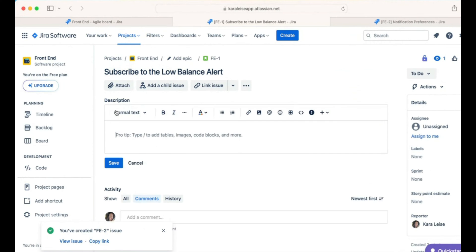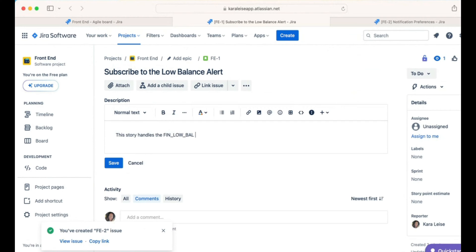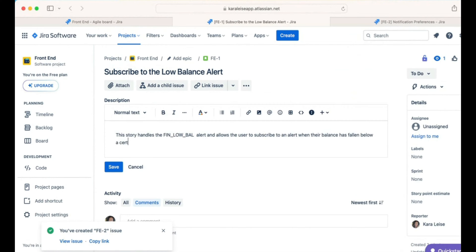Let's say that we want to describe what this story does. Now most of you jump in and start saying as a user I want this so I can have that, all the things I've taught you how to write user stories. But remember that you're going to be sharing this with a lot of people, some people are at different levels of understanding. If you have a large project, there are so many stories and even the product owner can get turned around as to what they're looking at. So help people by giving them a little bit of a precursor as to what is this story doing. We could start with: This story handles the Finn Low Balance Alerts and allows the user to subscribe to an alert when their balance has fallen below a certain threshold.